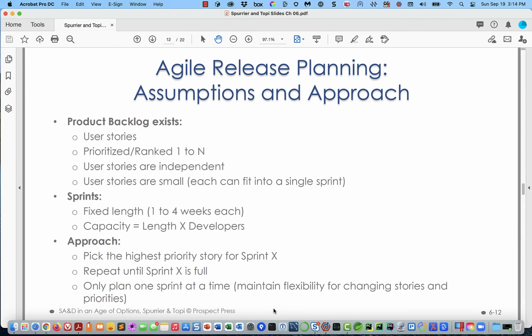Well, it has to do with the following thing. Even though the Agile people say that we're not going to plan this whole thing up front, people are going to want to know, well, what parts are going to get done when? So a lot of Agile project planners have this approach where they have a road map for the project. So they take all those features that you have as user stories, and then they go, well, when are we going to do them?